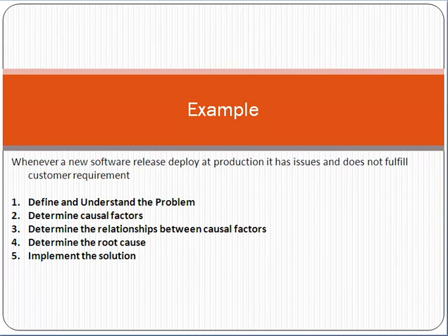First of all, define and understand the problem. Determine the causal factors. Causal means things which are not as per the routine. Determine the relationship between causal factors, for which you can use fishbone diagrams, etc. And determine the root cause and then implement the solution.